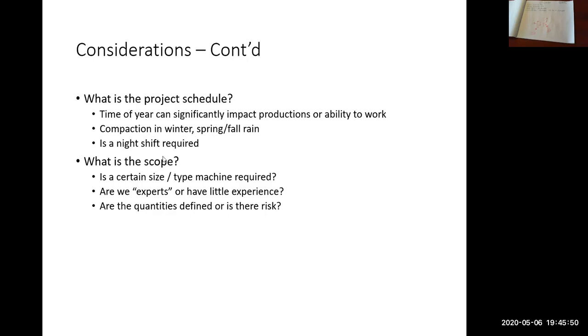Other things like, is a night shift required? Do you have to work 2 shifts per day? You know, maybe it's 2 8-hour shifts or 2 12-hour shifts per day in order to get finished. Do you have to work weekends? So schedule that's listed in the contract is very important. We've seen through previous assignments that working overtime is costly. It costs more to pay people overtime than it does straight time.